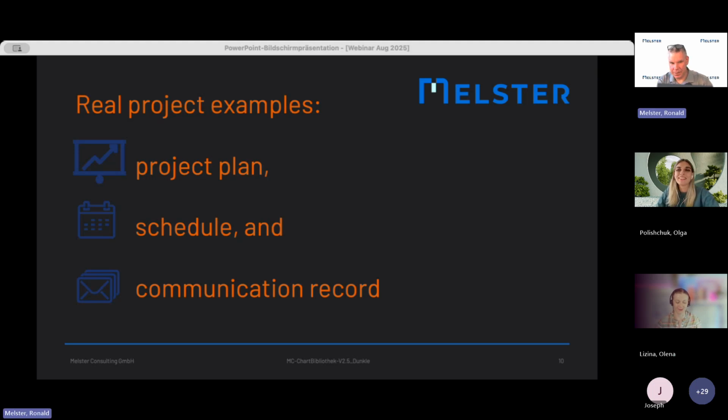Maybe. Yes, it is an information item as defined by Automotive SPICE, but just because someone sends something doesn't mean that another person actually reads it. But it is the same with the email. You can send and another person will filter it out to trash. Yes, and that's why we, as assessors or coaches, also recommend that for some important documents, we, in a project, should ask for explicit confirmation, something like, yes, I received this document or this information and I can confirm it. In other words, it's some kind of basic transmission protocol: send and then get acknowledgement.